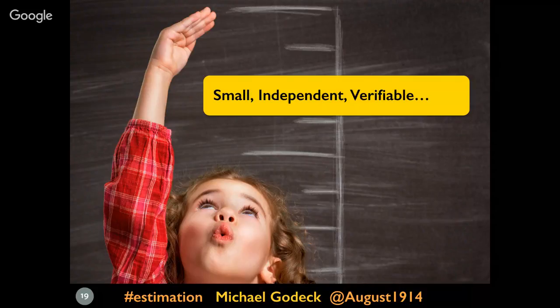So in backlog refinement, to try to stay out of the weeds, we really need to avoid solutioning and focus on the business objective. If we get into technical planning too early, it really gets in the way of the best outcome in any case. And we really have limited time to do backlog refinement. It's not unlimited, right? You had like 2 hours to cover 2 weeks of work, would be as much as you should reasonably put into it. So we need to focus on the aspect of decomposition, just to get the work broken down into statements of business objectives that still hold up as independent and verifiable, but are small enough to go into work, so that prioritization can be done against units of work that we could actually commit to, right?